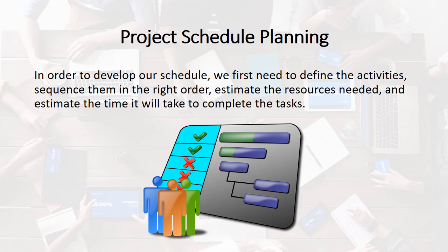Project schedule planning. In order to develop our schedule, we first need to define the activities, sequence them in the right order, estimate the resources needed, and estimate the time it will take to complete the tasks.